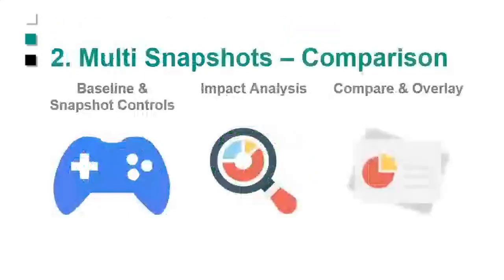Then you can have multiple snapshots sitting in this warehouse. So that's another huge benefit. If we want to compare last month's with 3 months ago, or last month with last year, if we want to compare this project to another project in this month, you can do all that very easily from the warehouse in P6-Reporter out to your reporting engine. So it just brings a lot more flexibility to your reporting capabilities across the board.